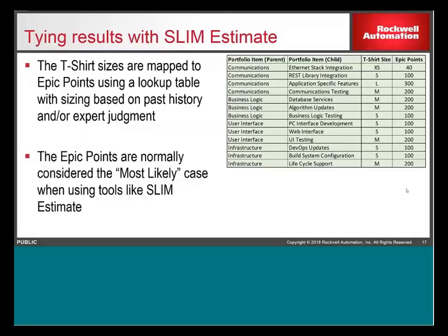We were doing pure Scrum early on the program, and actually just this past year we've transitioned over to using Scaled Agile, and we've ramped up 2 release trains. So I'm in the process of starting to collect some of that data from those early PIs. We'll probably be throwing away the first 2 PIs because there's a lot of learning curve there. It's useful from a standpoint of saying, okay, if we go to start another release train, how much work is that going to be? What is the impact of starting up another train?